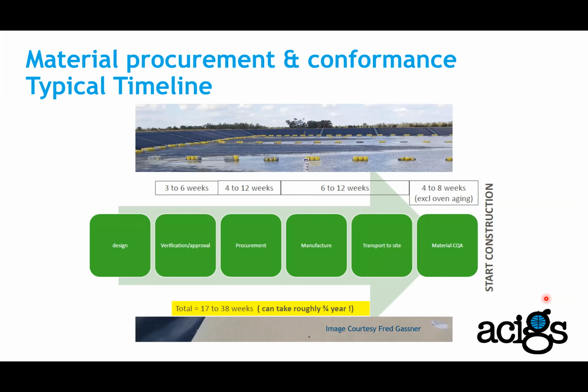This slide here, I borrowed from my ex-colleague and mentor, Fred Gassner. This basically shows, from the design down here on the left-hand side, all the way through the process until we start the construction, the timeline for verification, approval, procurement, manufacturing, transport to site, and the material CQA, and the range of timeframes for each of these steps.